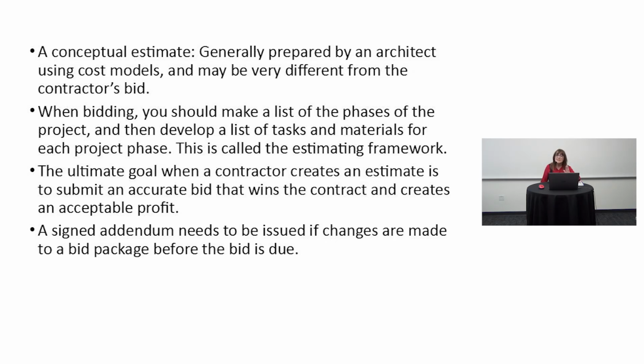Next one. A signed addendum needs to be issued if changes are made to a bid package before the bid is due. Now think back to that scenario where you're going to bid on your first big large project and they send you that bid package, and in it are all the things that you need to begin your estimate. So you lay out everything and all the requirements for the project, so that you can put it in phases and start your estimating.